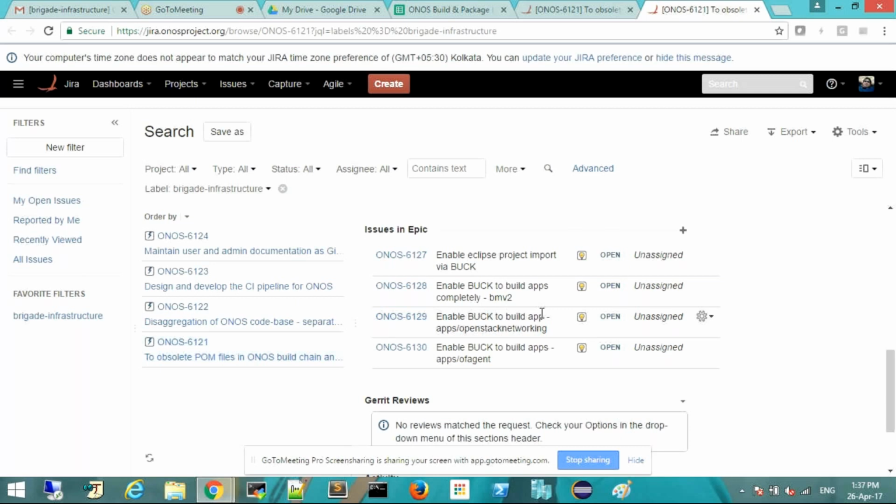Now, we also run sprints. For the ONOS project, we run sprints where you have 2 or 3 week blocks of time where you plan the activities for a group of people. Some components are related to the release, but sometimes the activities pulled into the sprint are not necessarily related to the release. So the sprints are a way of organizing the group's planning and work. You discuss what we need to get done. Some of those things are for the release, some may be exploration or investigation tasks.